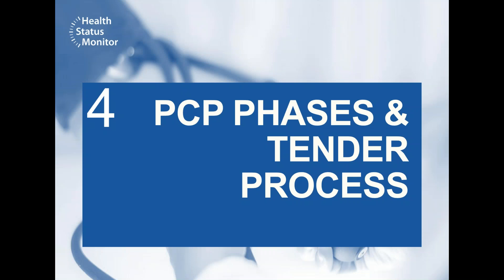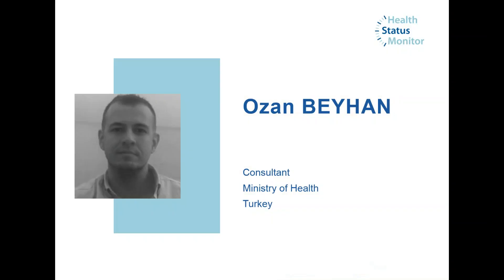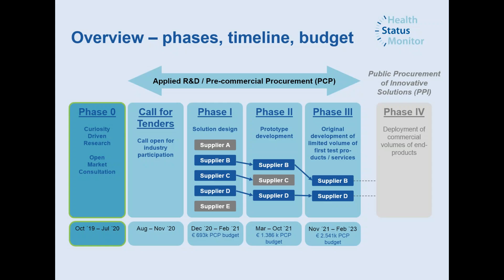We'll move on to more details about the tendering process. This time we have the indicated budgets for each phase and a clearer timeline for the project. After launching the tender in the summer and evaluating the offers in the fall, we are planning to start phase one in December and finish phase three in early 2023.